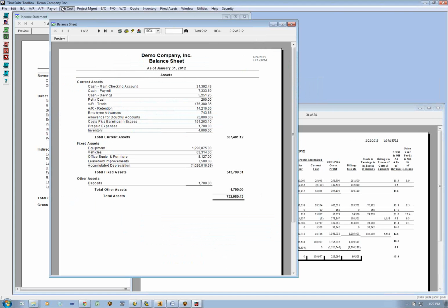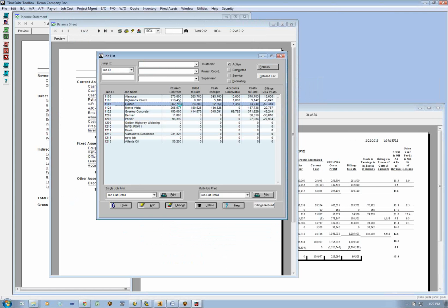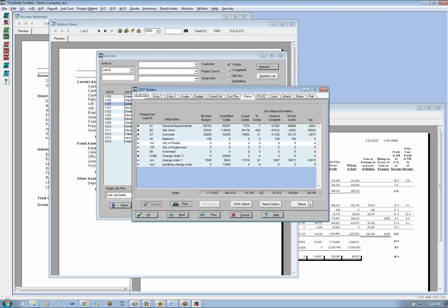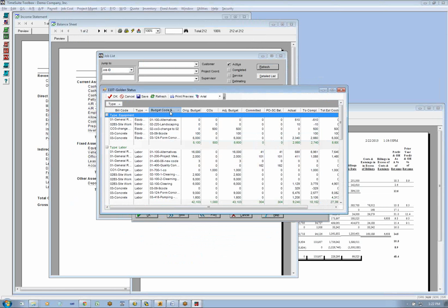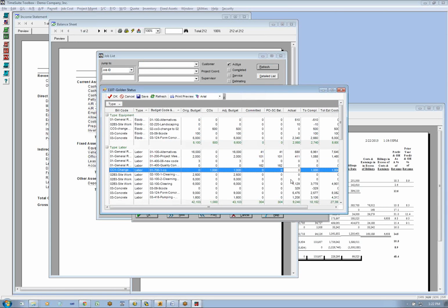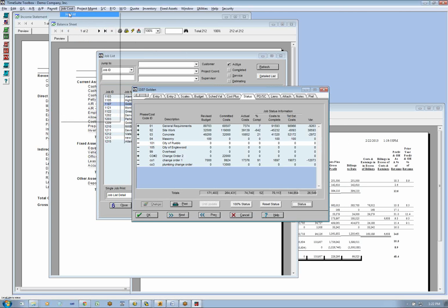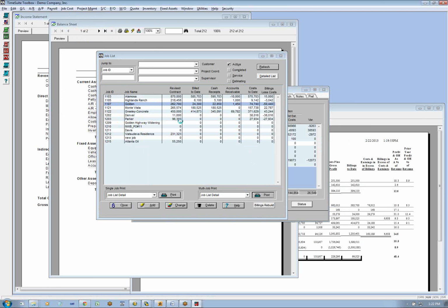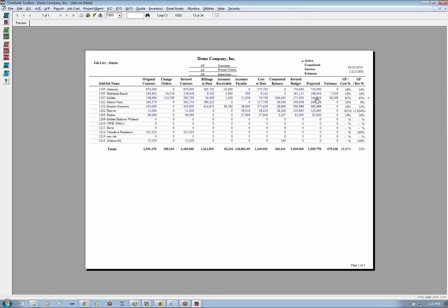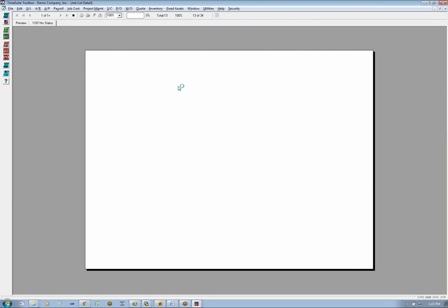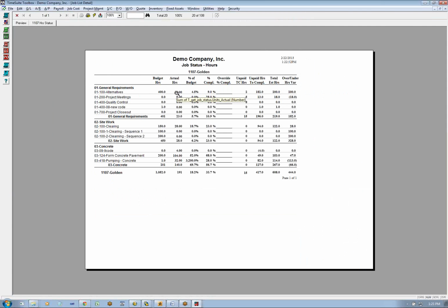Okay, so that was another way to do that, and the way that we're doing it in the cost control webinars, if you have a larger project, you'd use the job status, do your projections on a line item by line item basis, and here we were doing it by labor based on this dashboard report. Go to that golden job, go to projected, click on that, gives us our labor hour status, and you go to the field guys or the project managers, and they put in the percent that they actually are done, and it drives your summary contract.